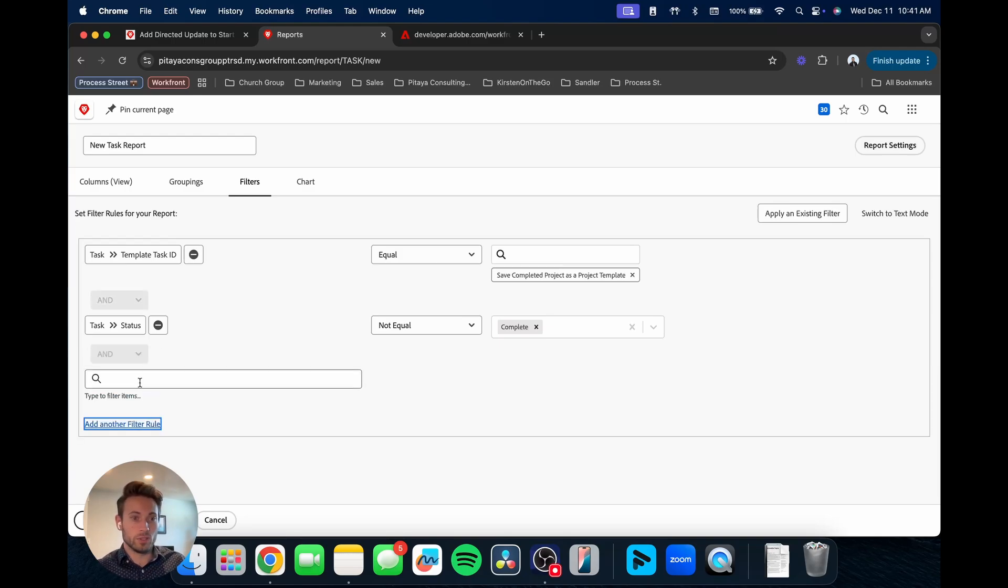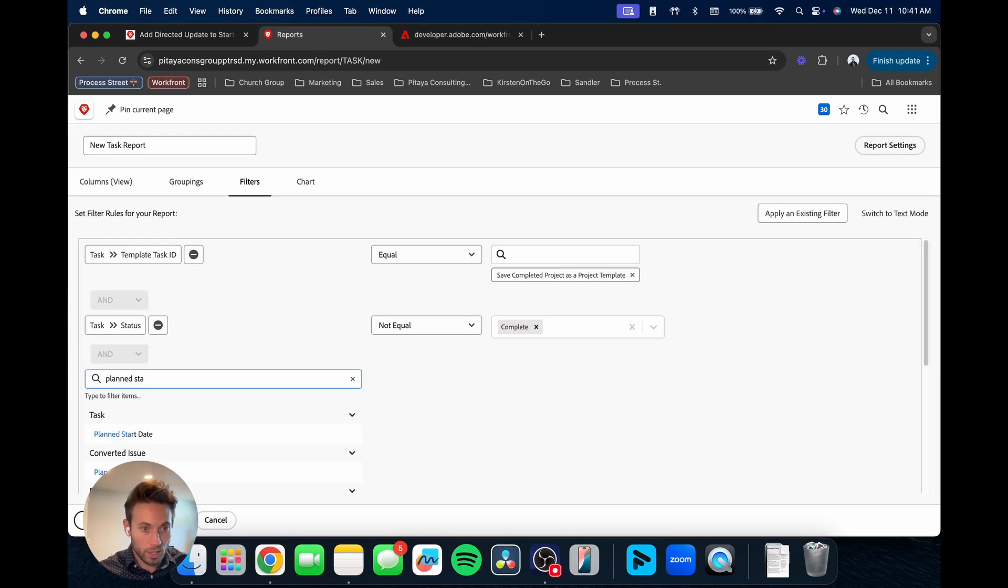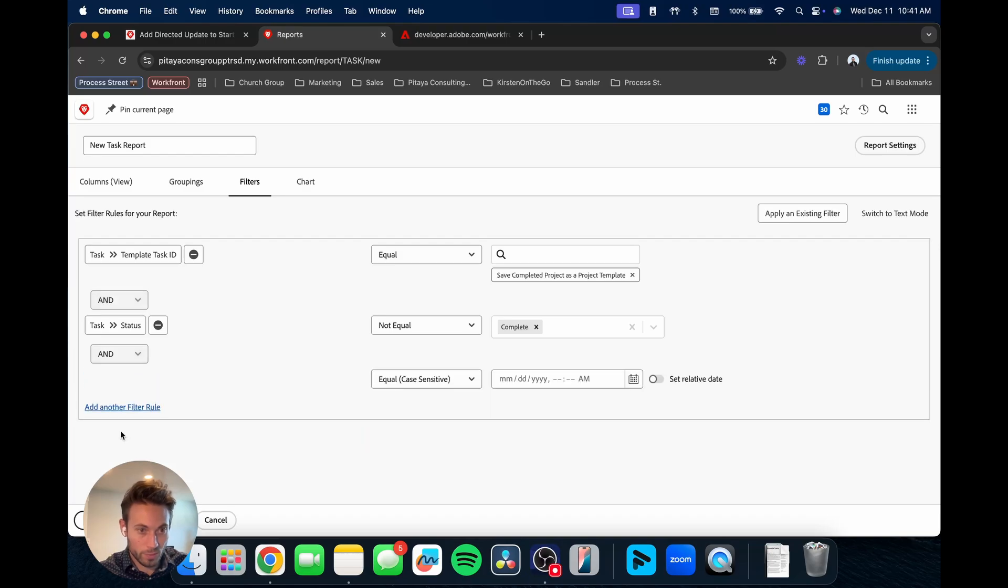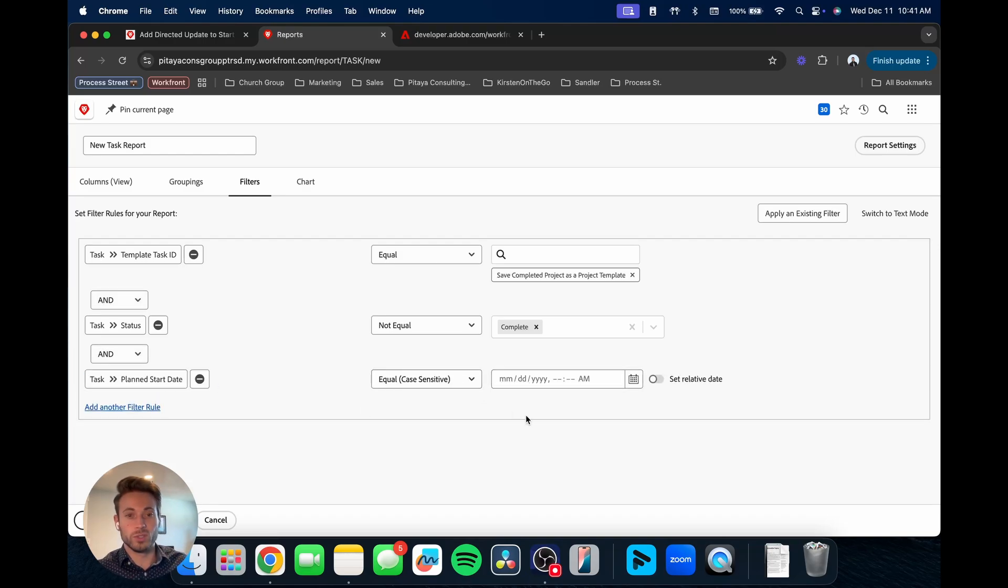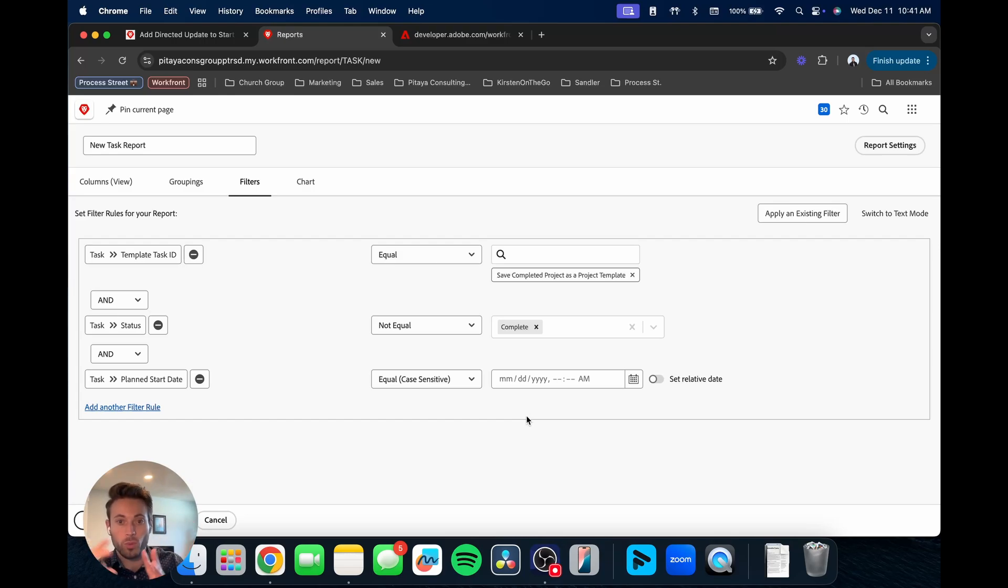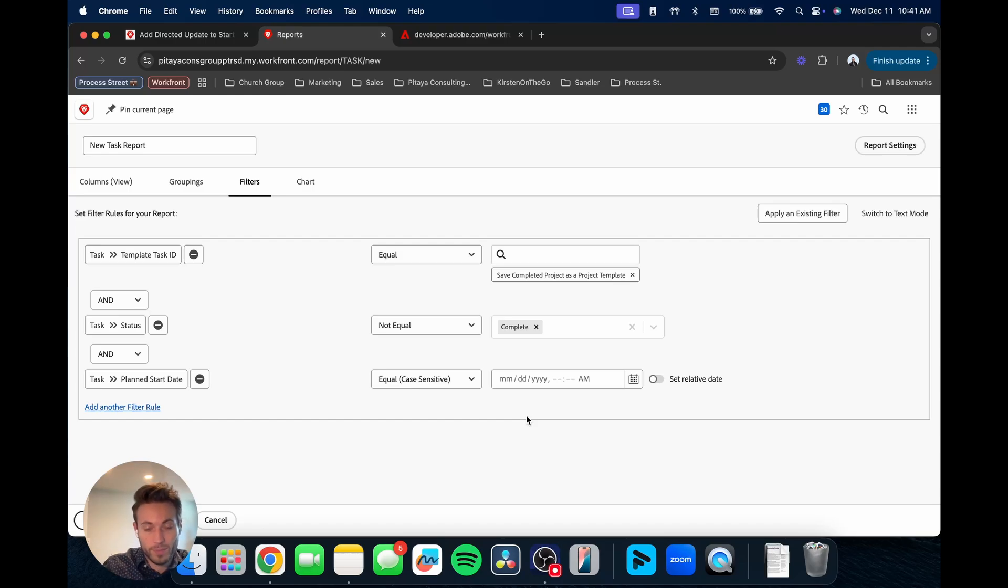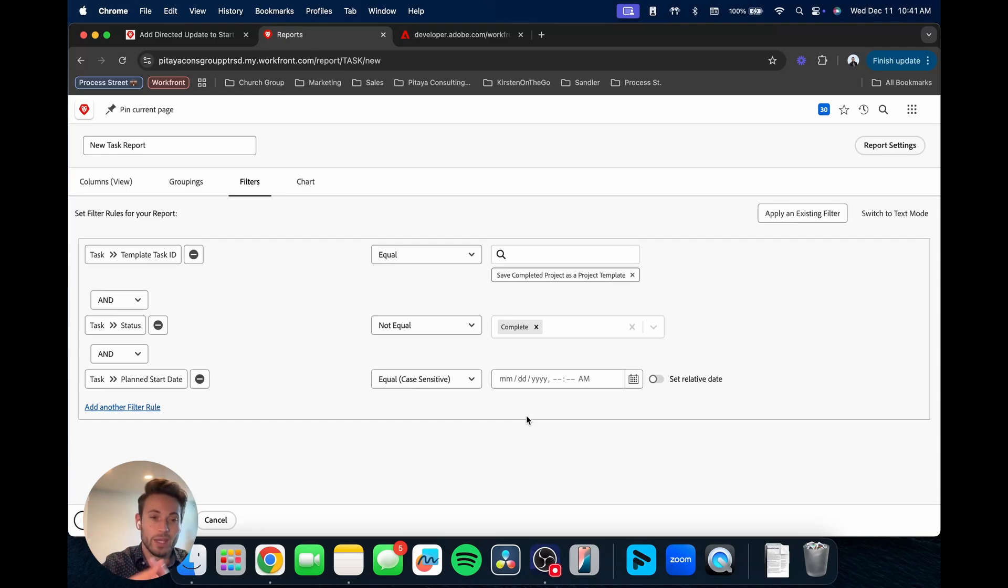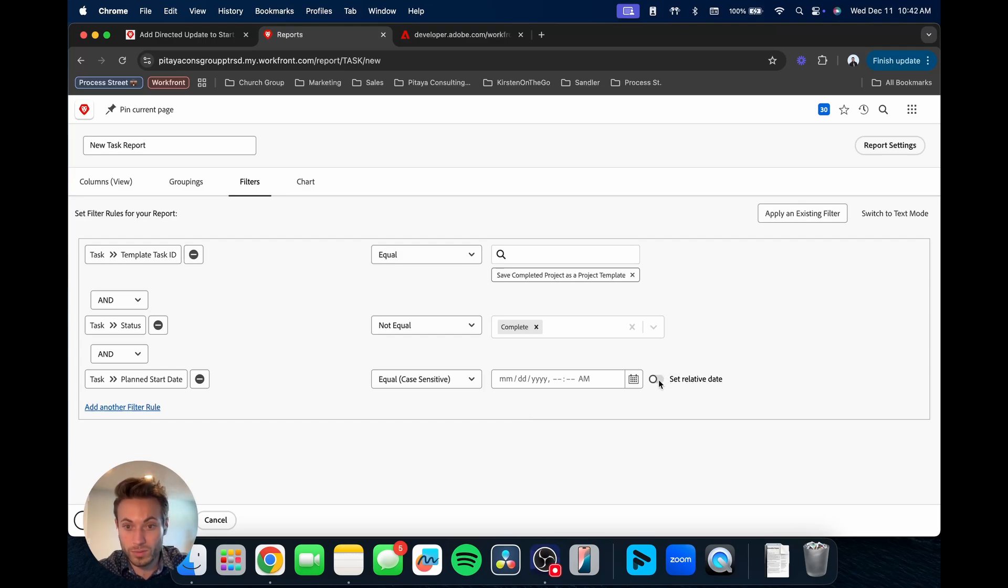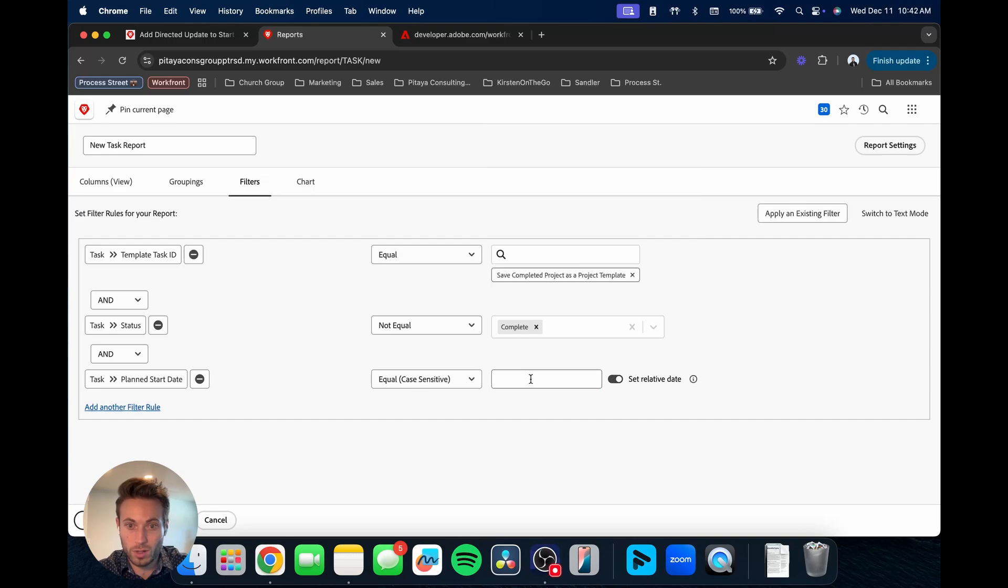So now we have template task ID is equal to that. We also said we want the status to not be complete. We don't want it equal to complete. Then we also were looking at the planned start date. And we want it to, we don't want it to be just a specific date because it's dynamic, we want it to move with as time goes by.